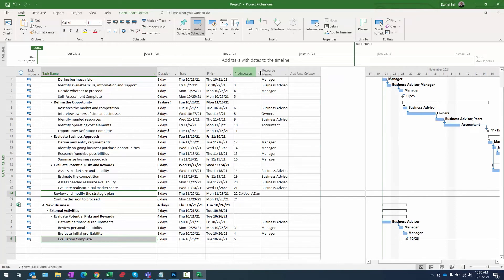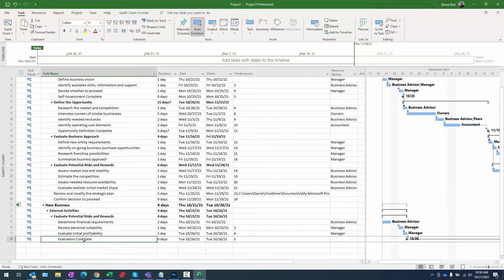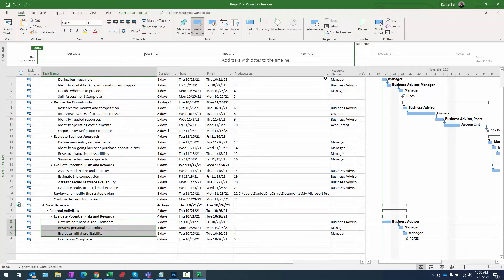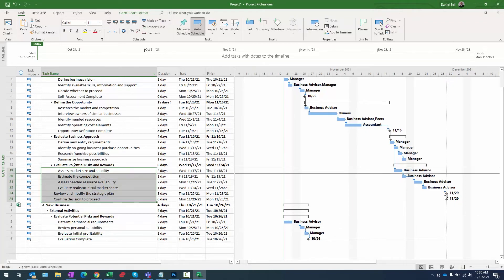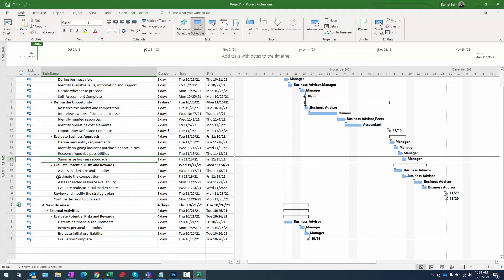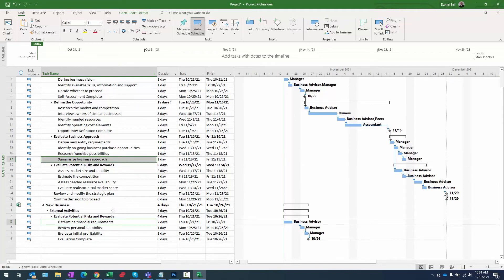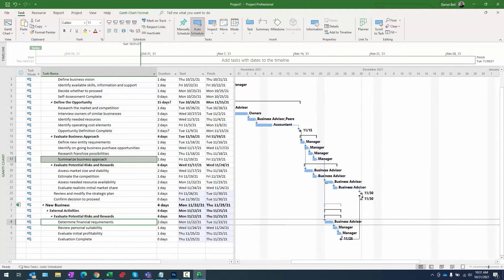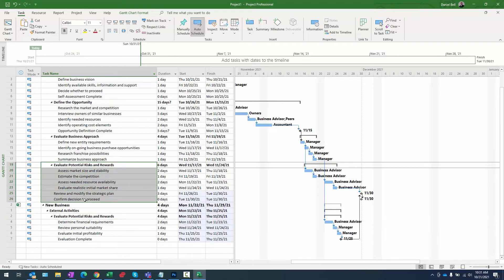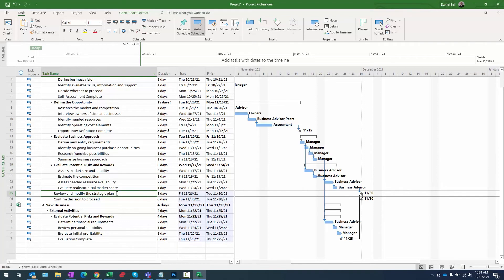In the predecessor column, we can verify the link — the predecessor of row 23 is 'evaluation complete,' which is the culmination of the external vendor tasks. Now for the start link: this task should also start when the prior set of tasks starts. I'll select the predecessor from the previous grouping as the successor to 'determine financial requirements,' click the link button, and the external task group slides over to reflect reality — beginning and ending within the correct set of tasks.